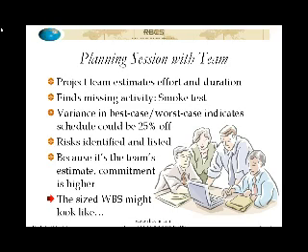Now, notice that at this point, the initial task list was put together by the manager or lead. At this point, the list has been vetted by the entire team, and the effort and durations came from the team. They did not come from the manager. So the level of commitment is going to be higher. I mean, that's just natural. If you tell somebody, I can do that and it'll take me this long, then it's a point of pride, if nothing else, to get it done in that length of time, right?